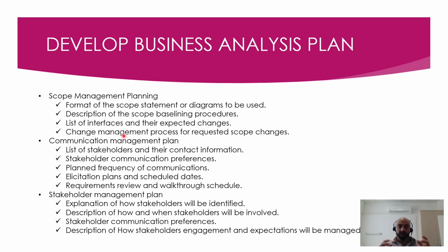Scope creep is adding additional changes or features or scope to the solution scope without assessing the constraints, that is cost, time, and quality. All these constraints need to be assessed before we start adding anything. Therefore we need to utilize a change control process.